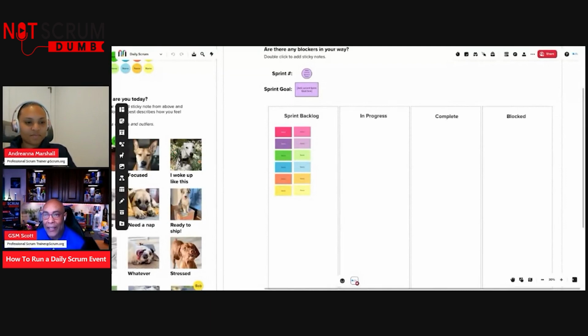So what I did at a retrospective was, hey, why don't we introduce metric Mondays? Because our sprint is over on Wednesdays. So we say 2 days before the sprint is over, how about we actually deep dive and look at all the stories that we've got open that are not completed and really just dissect those and identify, do a round robin.